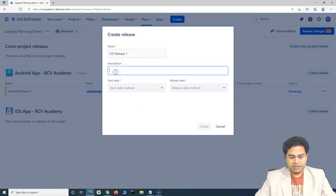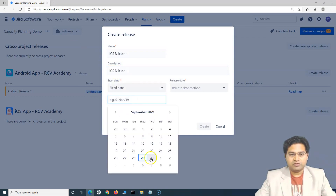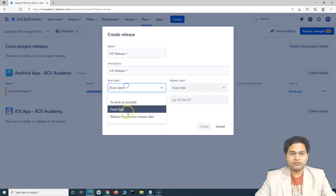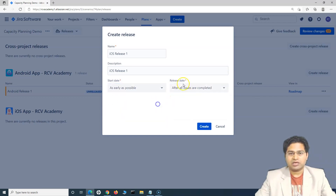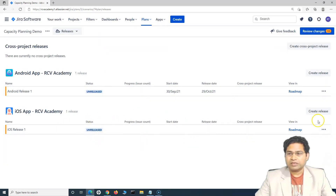Similarly, let's create an iOS release — you will be having multiple releases. For this one let's say 'as early as possible', and you can choose the release date as when all the issues in this particular project have been completed. So there are multiple options you can choose from.